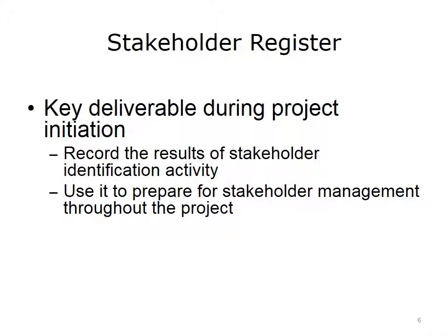The stakeholder register is a key deliverable during project initiation. The key activity so far has been to identify the stakeholders, recognize the possible roles they will play in your project, and understand the incredible range of possibilities for individuals involved in the project. When you have identified stakeholders and their responsibilities, capture that information and record it in the stakeholder register.